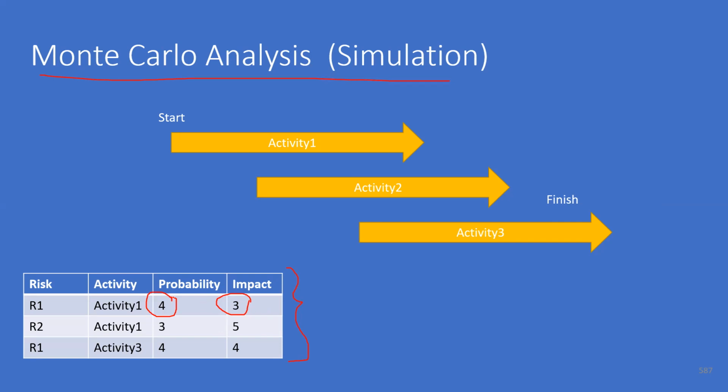So we will not try to make probability zero, but we want to know the ideal values for this, because making this zero can be an expensive affair. An earthquake-resistant building which can withstand, let us say, an earthquake up to 7 on the Richter scale is more viable than an earthquake-proof building, because the cost of construction can be very, very high.